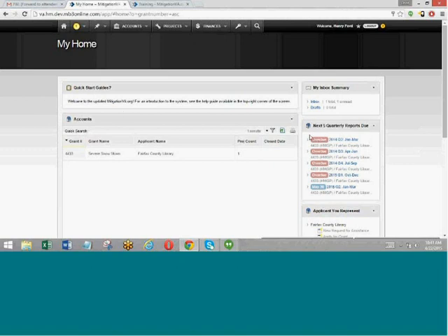On your right-hand side, you have your core reports section. It just lists all the core reports that are due, and the system auto-generates these core reports. We'll have a look at one later on in the call, but the system automatically generates these quarter reports about 30 days before the end of the quarter, and you'll have until about 30 days after the quarter end date to complete and submit these quarter reports. But we'll look at that in just a second.